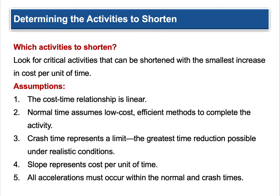Now, how do we determine the activities to shorten? Which activities should we shorten? Look for critical activities that can be shortened with the smallest increase in cost per time unit — find places where you could trim the fat without devastating the project.